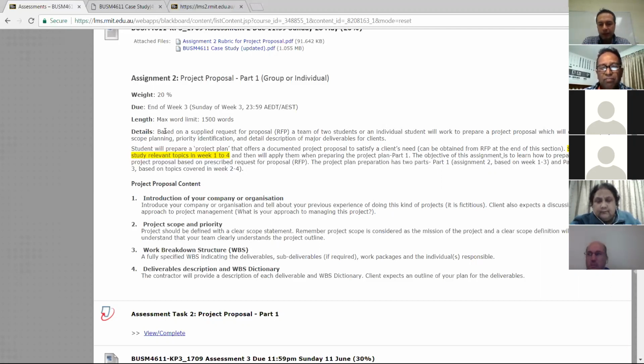Okay. And what after that? When you decide on a supplier, probably one milestone could be supplier selection, your final option. Then we have to offer the testing or demonstration. Okay, demonstration. So that would be another milestone. So you will need to recognize these milestones in your project scope statement.